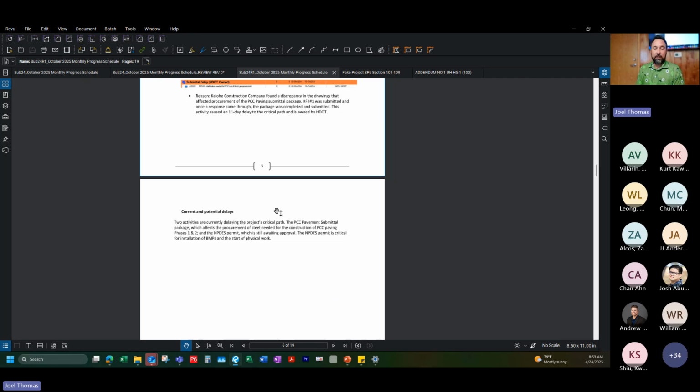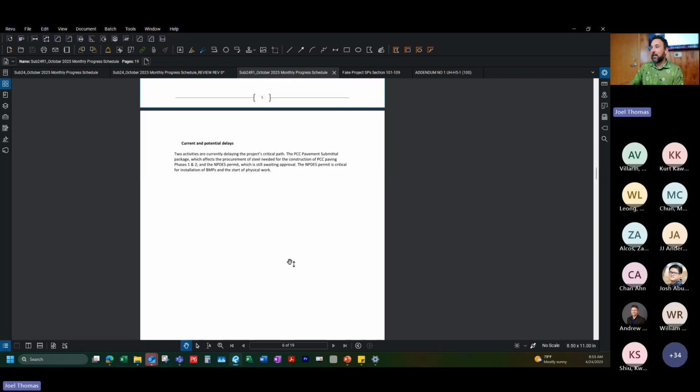It's not enough for them to just include it in a schedule update and say, hey, look, you acknowledge my schedule, now you owe me a bunch of delay. They have to be notifying the owner and giving notice within the time frame and all that, because we see a lot of that too.